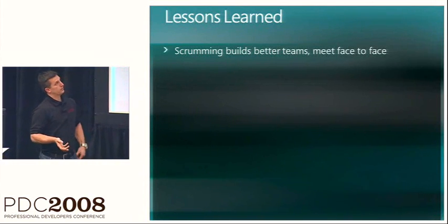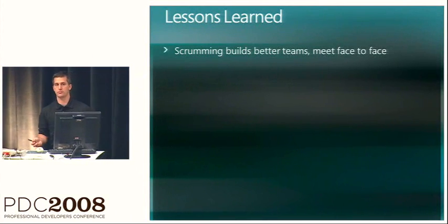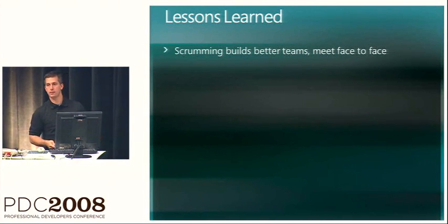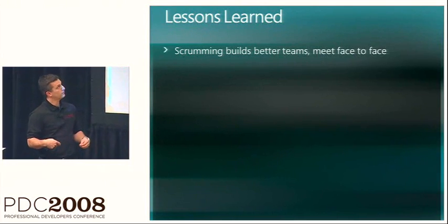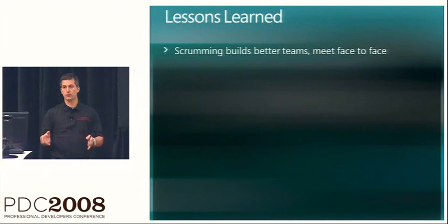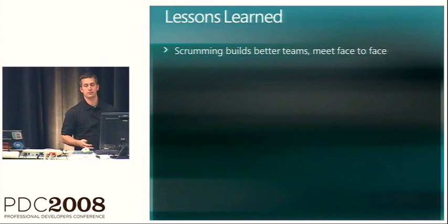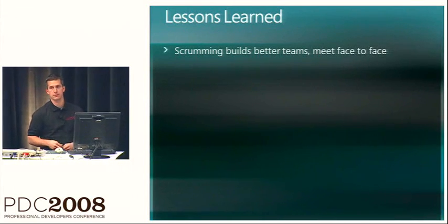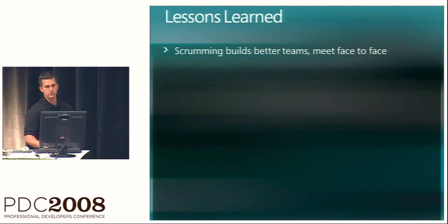And the reason why I bring this up kind of in an RFP positioning is that it costs extra money, right? It costs extra money to buy plane tickets. It costs extra money for hotels, et cetera. And especially in these financial times, people become T&E averse. I encourage you, if you're working on a big project, book in this time. Add another 15 or 10% to the budget, and then explain why this is so important. It really helped us, and I think if we didn't do this, we wouldn't have been as successful.